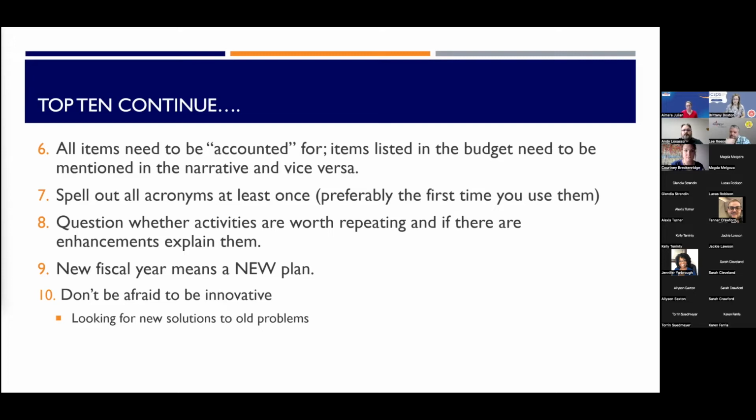Yes. So within my institution, and I work a lot with federal funding, a sub-grantee is somebody who is taking an aspect of your scope, completing that aspect, and then reporting up to you as the grantee, and then reporting up to the funder. And what I think is good practice is that they have the same reporting mechanisms that you have as a grantee. It's not just, hey, Andy, come be my sub-grantee and then let me know how that goes. No, no, no. They have the same quarterly reporting, or whatever the reporting is. I said quarterly, but I know now there's everything from monthly to biannually. So whatever that report is, again, back to reading the directions, they're held in the same regard.